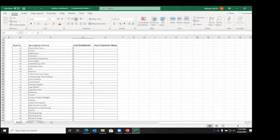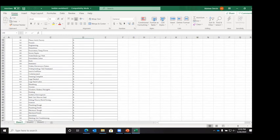And so this worksheet will give you kind of a baseline, or some checklist items, or a breakdown of line items of the different things that you're going to have to go out there and secure numbers for. If you're hiring a GC, you don't have to worry about this, because the general contractor is going to have a spreadsheet similar to this, probably something more involved, and he's going to be responsible for going out and getting all those numbers for you to determine what that total cost is. If you are one of our clients serving as your own GC, then certainly this is going to be your responsibility to go out and get plumbing rough-in, mechanical, electrical, cabinetry, countertops, etc. Now, we'll give you our number for a designed, engineered set of plans for the log and timber structure, for the walls and the floor and the roof and the porches and the labor to install that. And then at that point, you go out to your other subs to get numbers on all those other finishes.